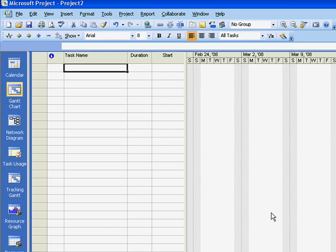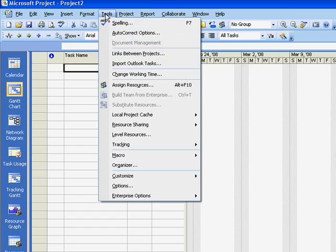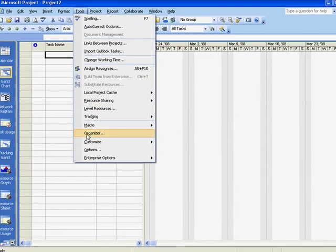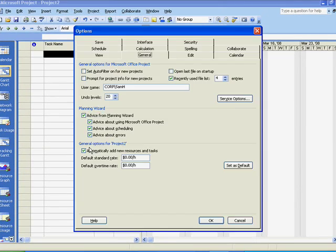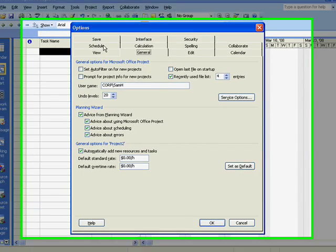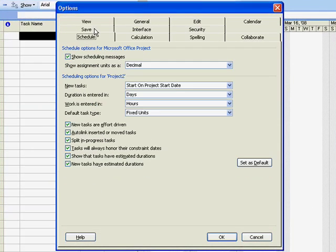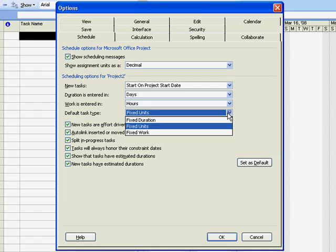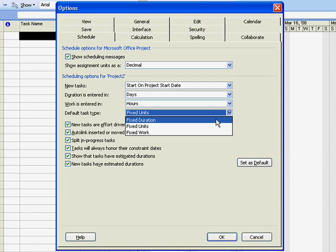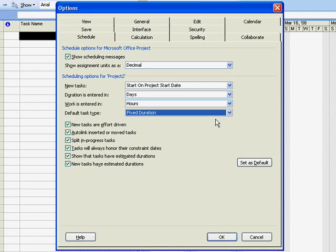To set the default task type, on the menu select Tools, then Options, and the Schedule tab. Here you can set the default task type. This is also the place to indicate whether new tasks are effort driven.